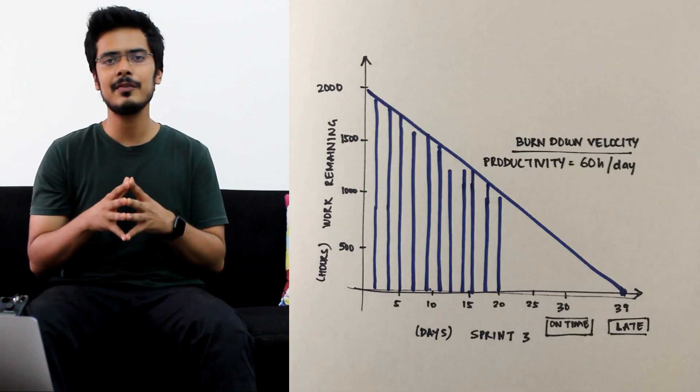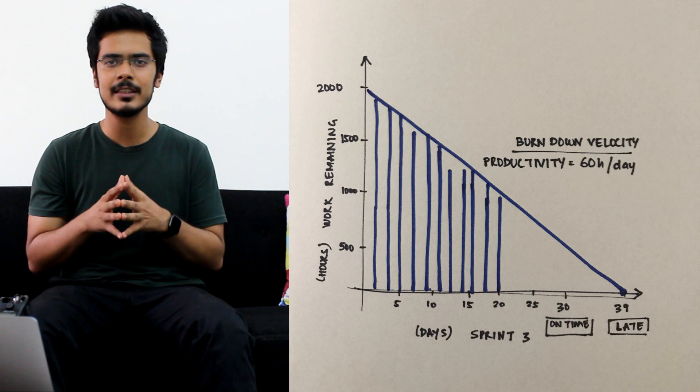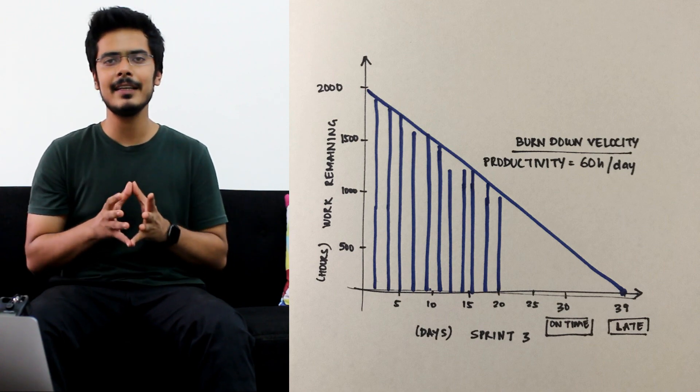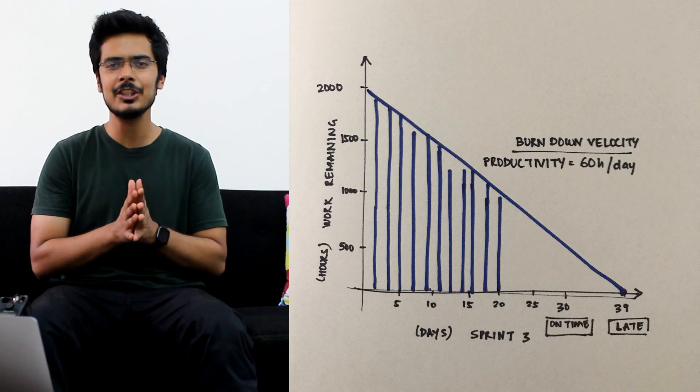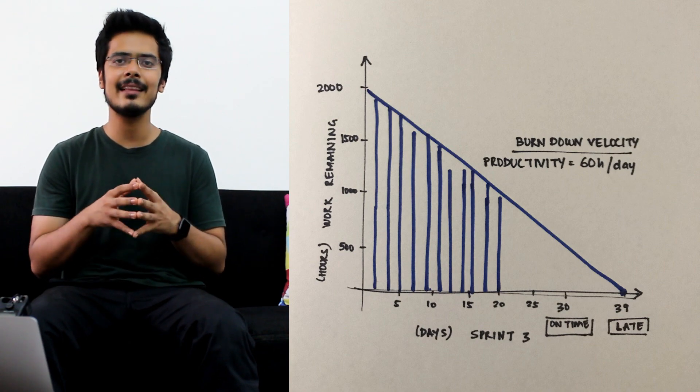The slope of this graph, typically known as the burndown velocity, will tell you the average productivity of your team in a given day, which can be used to estimate the completion date of all the user stories in the sprint.